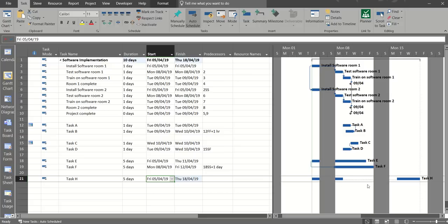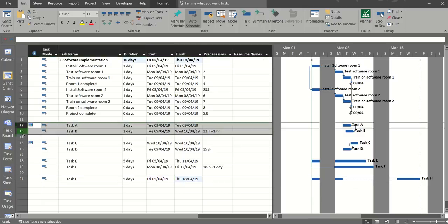That's something that the computer sometimes does when you level tasks, but it's also something you can do manually. So you could have a resource on this task, and then you want to split a task because you've put them on a task that sits in between there. That way they won't go over allocated. It's just a tool that you can use, and the computer often does that when you do leveling. Okay, so I'm just going to get rid of these loose tasks.